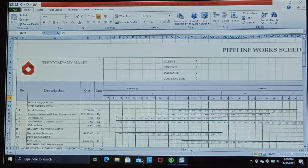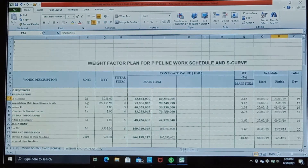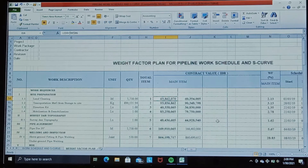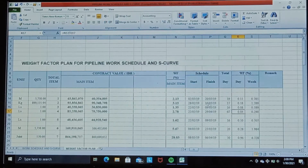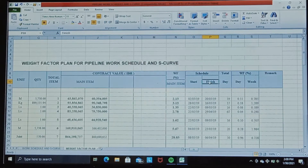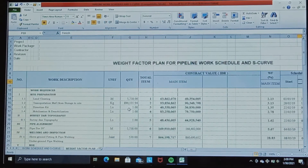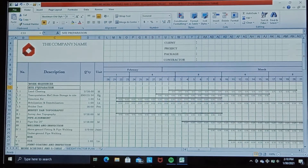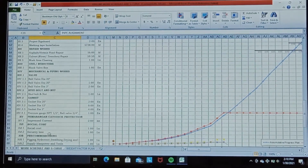I have divided the data into two worksheets. First, a worksheet that contains how to determine the weight factor generated from the contract price, and the schedule start and finish. Second, a five-planned work schedule and S-curve arranged sequentially according to the work steps: site preparation, survey and topography, pipe alignment, welding, and inspection until pre-commissioning.